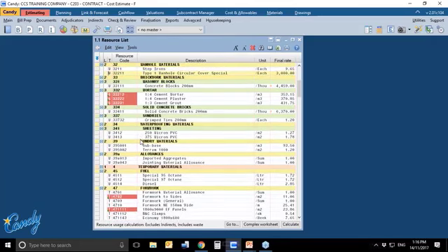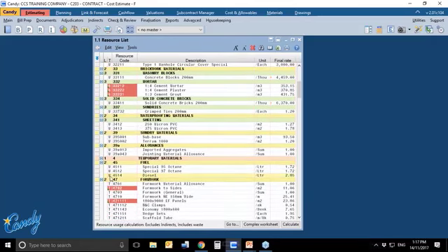Now, if I look at diesel, which is a material resource, type M, resource code 4514. I'm buying diesel at 2.85 dirhams a liter, and I've got what we call a resource final rate. That's my final rate. The final rate is a rate which is used on your worksheets, price code worksheets and complex worksheets, and the final rate should always be in your pricing currency. In our case, the pricing currency is AED. So this rate here for diesel is 2.85 AED per liter.